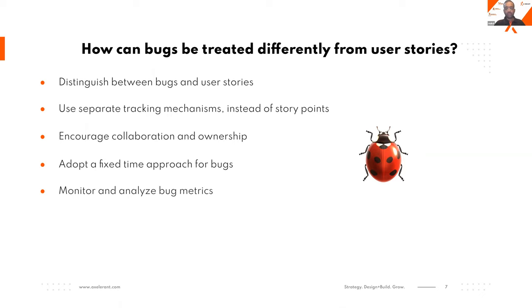You have to analyze your bug metrics separately. Might be you are having, say, 10% bugs every sprint. You are saying now this is increasing, we have 15% bugs every sprint, or it's decreasing. We have our technical management in place. There is no issue now. You can see the units which you're giving to bugs without story points are still trackable.